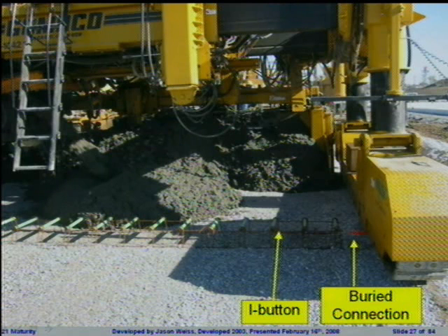We use some in the lab that are a nickel a piece. They'll use some that are $40, $50 a piece in the field. The question is really, as you go to higher and higher costs, are you dramatically saving costs in labor, installation, things like that? And more importantly, a lot of times the sensors that you're using are dictated more by the data acquisition system that you've got. If you were to start off today buying a system, you may buy something very different than you bought 4 or 5 years ago, just based on what's out there.